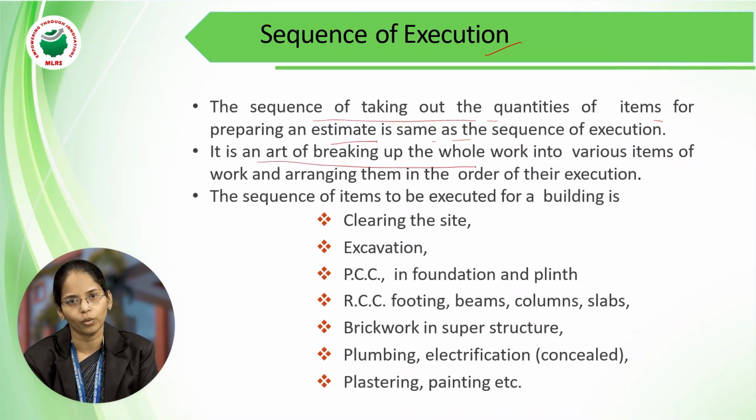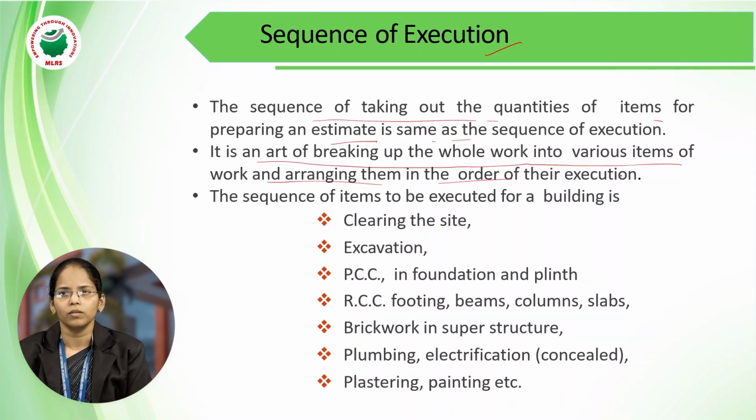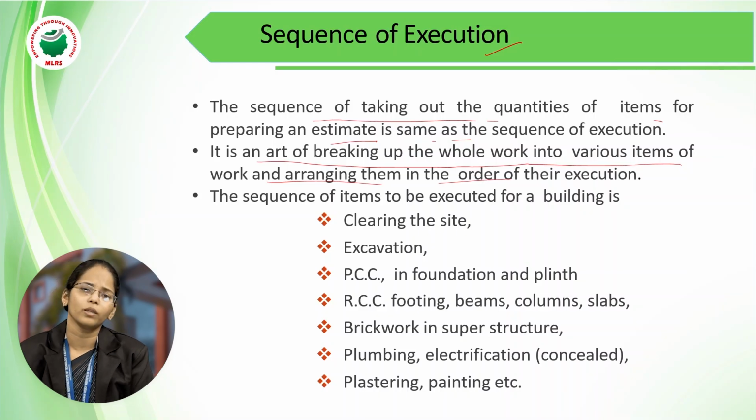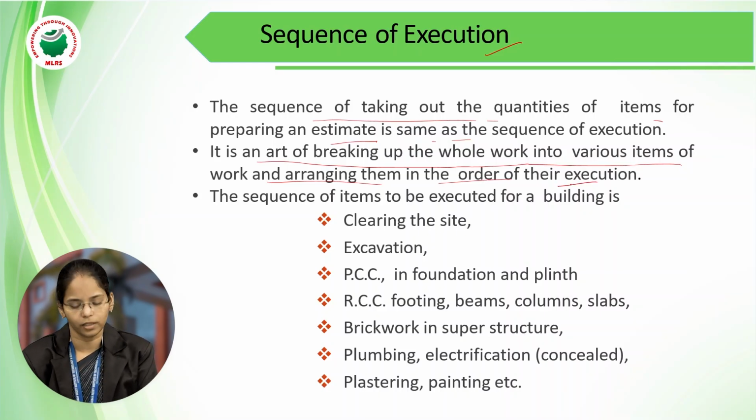It's an art of breaking up the whole work into various items of work and arranging them in order. If we talk about the complete structure, when we separate it, we differentiate it into substructure and superstructure. In the substructure there will be a number of various works, and in the superstructure also a number of various works. So the complete structure is divided into various parts to define the order of their execution. Next, the sequence of order. Let's see.